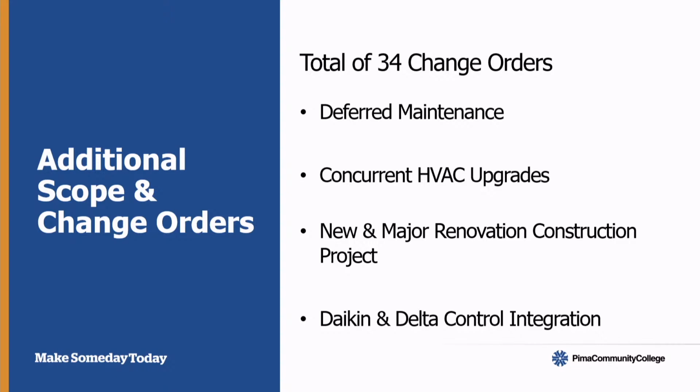As I mentioned earlier in the first slide when I was talking about project scope, we initially had a substantial completion date set for April of 2024. The kicker was that we extended it through change orders for additional work that was discovered, which moved our substantial completion to April of 2025. One thing to remember is that we had mechanical systems that were anywhere between 20 to 50 years of age. So discovering those on a project of this scale is going to happen.